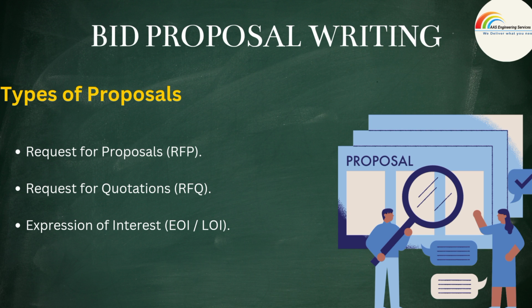Then expression of interest, EOI, or LOI, letter of interest; both are used in different countries. It is not a full-fledged contract. In the USA it is called solicitations. It comes prior to the solicitation or prior to the contract announcement. In response to the announcement, you will never submit the complete proposal or complete plan.